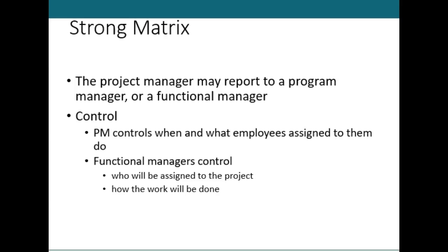For example, in a strong matrix organization, the project manager has more control, more authority. But you want to define it like this. I worked at Scott Air Force Base, Illinois, my last assignment. And there they went to a matrix organization for a new headquarters. They said, we'll have a new headquarters, but we won't need people. The leadership can reach out to the other headquarters. Well, that was a good plan, but they never defined whether it was a strong, weak, or balanced matrix, right? So who do I commit my time to when there are competing demands, right? So you want to define it.